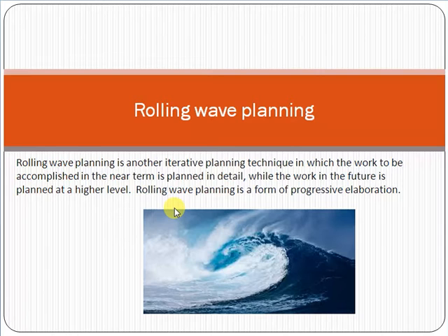At the time of planning, when you are in the planning phase, you do detailed planning for the planning phase, in which you decide how you do the scoping and how you do the functional specifications. So the main focus is on the current phase. For the rest of the phases like development, testing, and production deployment, we just do rough estimates, and we will do the detailed planning later, because right now we are in the planning phase.